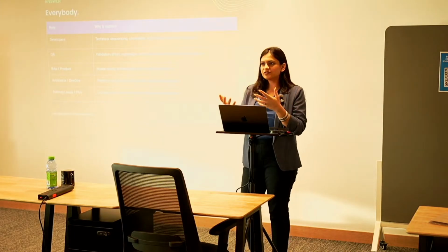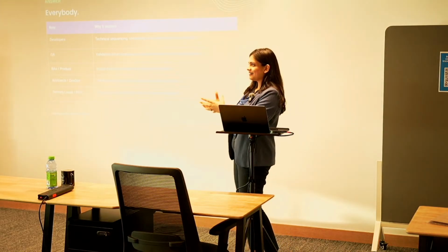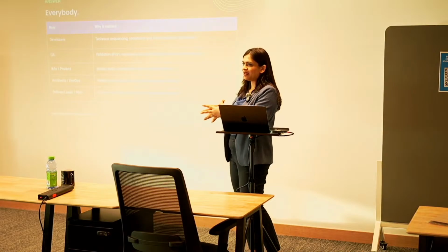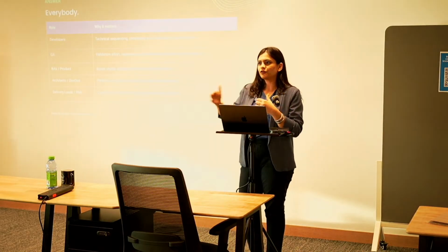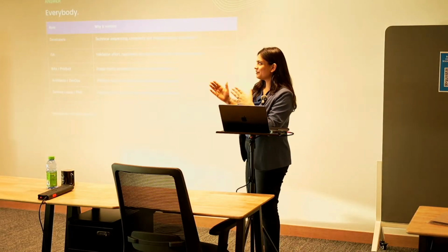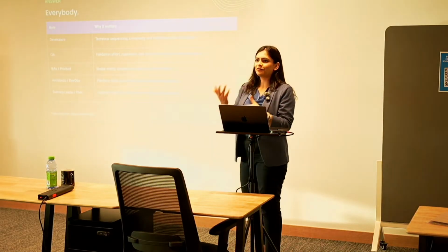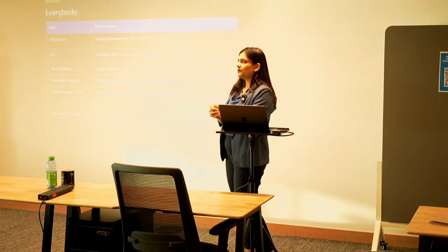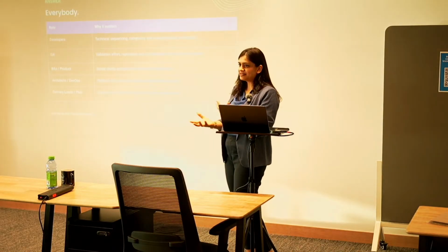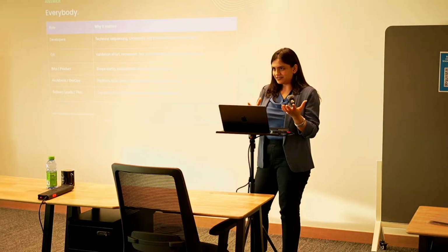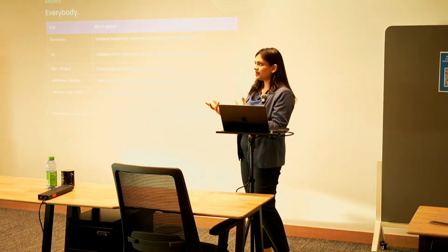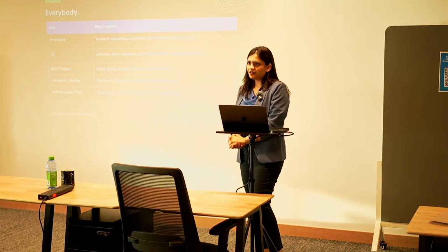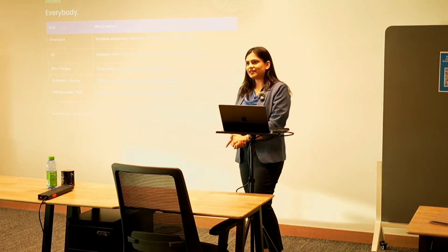Those kinds of inputs don't directly bake into the release plan, because estimation is something you would do as a prerequisite before your release plan is made. And given the topic is specifically about that, I do agree with you. I think having a lead could suffice, but for the prerequisites, which is having the backlog of work estimated and prioritized, even if you have senior developers, it has worked well in my experience.